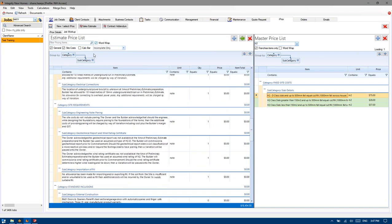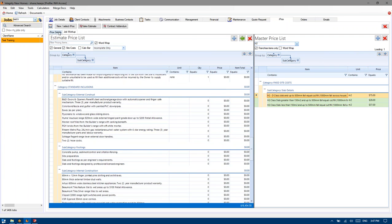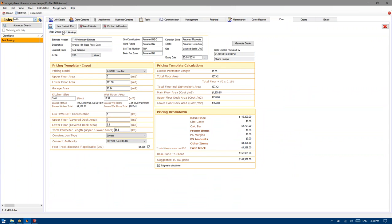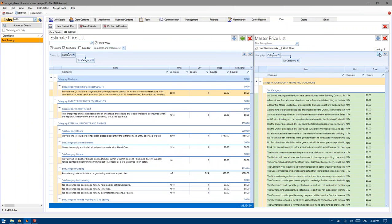Shane, can I ask you a quick question about the loading on the far right-hand side, please? Yes, what about it? So see how it says 1 — does it always have 1 against it? It does not. So if the price level for the consent authority in business contacts is less than 1, then the master price list will not lower the price. Our master price list is what we state an item should cost based upon our knowledge and isn't necessarily based around minor adjustments you may see in some areas.